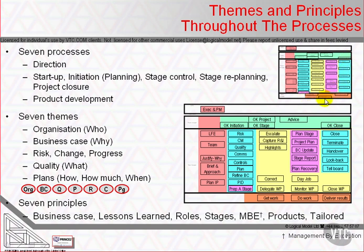This bottom layer being the product delivery. And here are four or five levels of management: corporate program management above the project, project board directing, project manager managing, and then team managers and team members receiving the commission of work packages and executing the work packages.